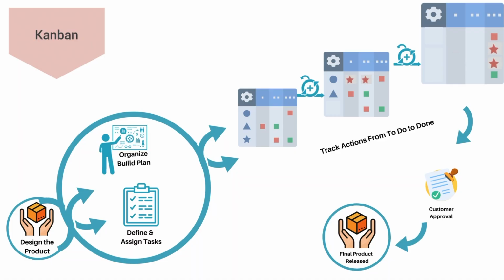Now let's look at Kanban. This approach emphasizes continuous delivery while not putting a tremendous burden on the development team. Unlike Scrum's iterations, the Kanban framework offers a constant, flexible work stream. These 3 concepts of Kanban are visualizing your workflow, reducing the amount of work in progress, and improving workflow and preventing backlog. When should you use Kanban in your project? When your project scope is constantly changed due to high priority or emergency situations. When the project necessitates flexibility or frequent priority shifts. When the primary purpose is providing a continuous and maintainable support system post-launch.